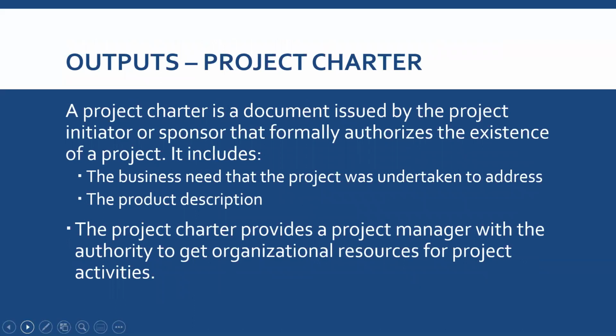And now I'm going to move to the output. The output is what we need for the define phase. The first output you should have is the project charter. If you're not familiar with this concept, this is a document that has the project name, project sponsor, the team, the purpose, the budget, the resources, the timeline, all the details about the project that you're working on, and the needs for the project.